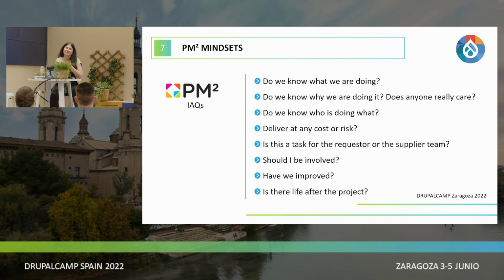So we finished, it's done. And then we realize that the client might need to maintain it, and we are all panicking because we have to create an admin tutorial, user tutorial, editorial tutorial, and provide them trainings. This is very common, that we forget about that. So it's very important that from time to time in the project, you ask yourself and you talk with the team about these questions.